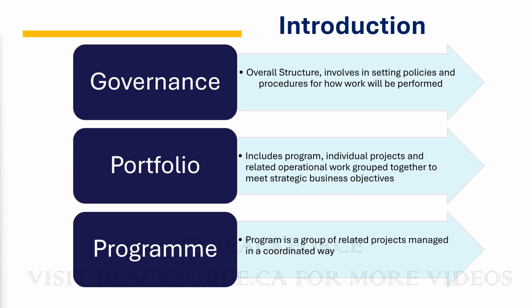So in that scenario, for example, in 2019, I was working on a project called Digital Transformation Project. Program. So the program was a digital transformation program. So they were different projects, but at the end of the day, what we are trying to achieve is digital transformation. The projects that we had under that digital transformation program were: we wanted to do a mobile app development, right? We wanted to do workflow automation. We wanted to upgrade Windows 10 from Windows 7. We wanted to do Office 365 implementation. We also wanted to do digital meeting rooms, right?